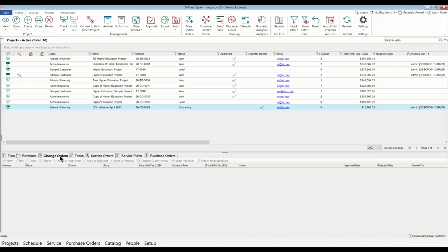Now, we won't get into change orders today, but just to tell you a little bit about that, once this project gets approved in here, any additions or subtractions that we do on this project is automatically going to get logged. So there's no issues of somebody going in and making a change and forgetting to tell somebody or forgetting to document it. The platform is going to do that for you. So you'll have a full history. You'll know who added what, why we removed it, why we added it, what's pending to be added or removed. All that gets flagged and tracked and managed here as a part of our change order process.